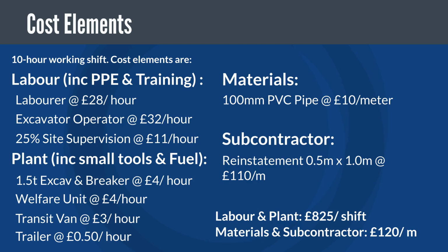Small tools and fuel are included within the plant rate, and PPE and training is included within the labour rate. By detailing these costs, we can calculate the direct expense involved in laying each metre of pipe.